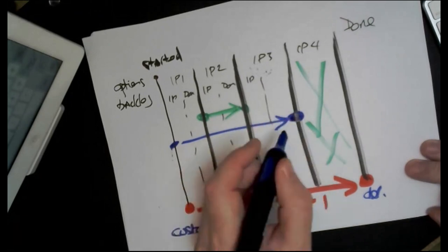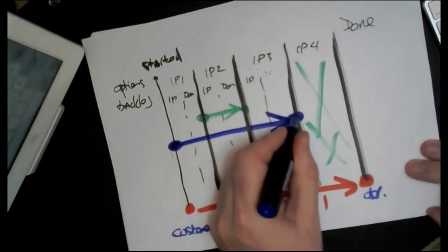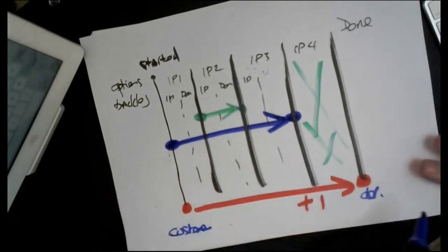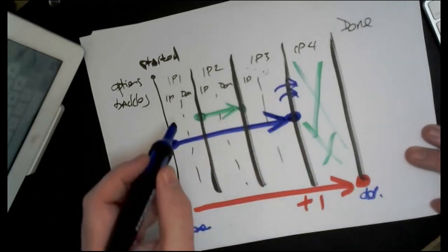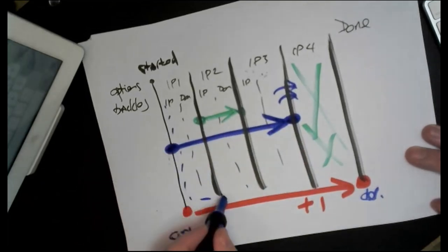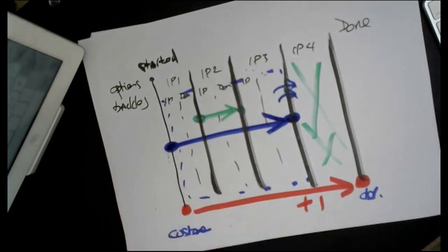It depends on the context, being honest, right? But it's important to have just one start point and one end point. And then of course, the amount of work that goes over that end point would be your throughput. And then the WIP would be whatever is between the start point and the end point. And then of course you're watching the age of the items as well.